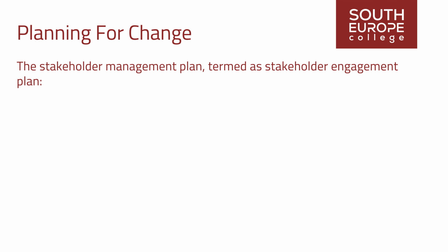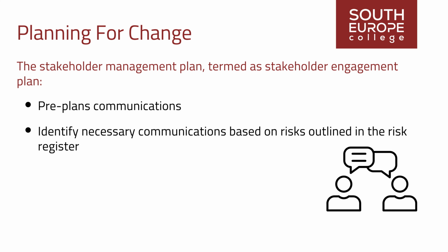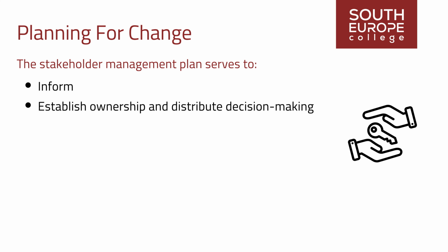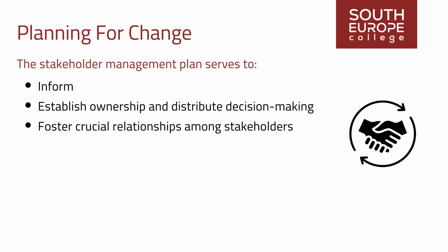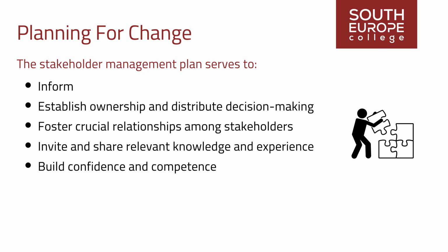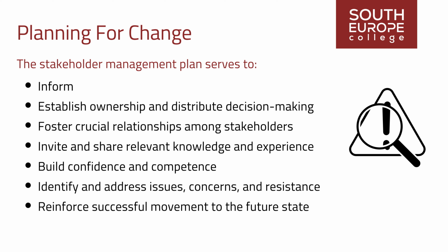The Stakeholder Management Plan, more aptly termed a Stakeholder Engagement Plan in the context of change management, not only pre-plans communications, but is crafted to identify necessary communications based on risks outlined in the risk register. Regarding change management issues, the Stakeholder Management Plan serves to inform, establish ownership and distribute decision-making, foster crucial relationships among stakeholders, invite and share relevant knowledge and experience, build confidence and competence, identify and address issues, concerns, and resistance, and reinforce successful movement to the future state.